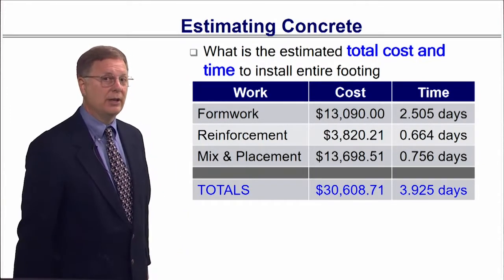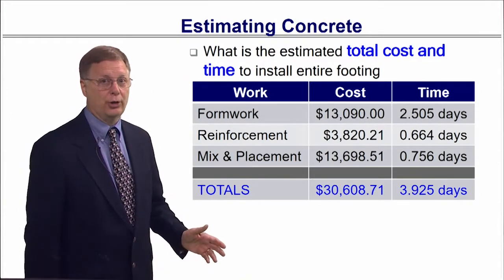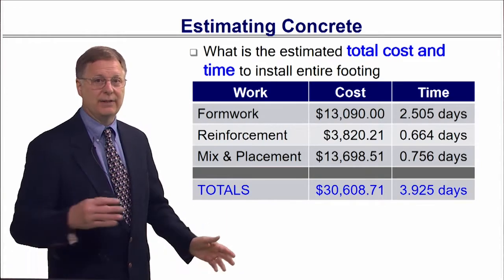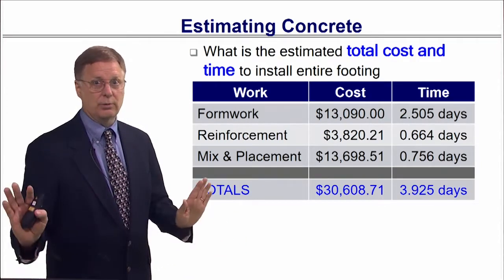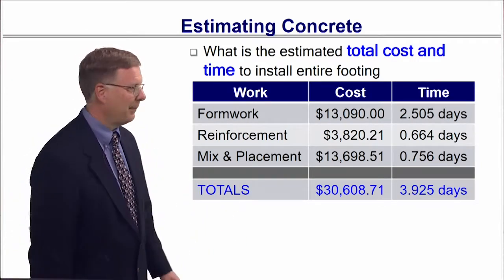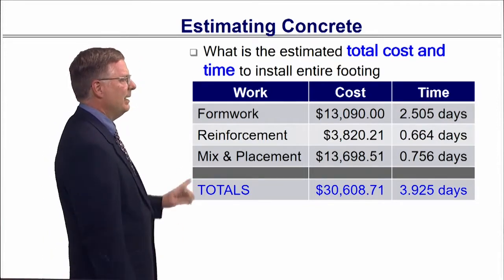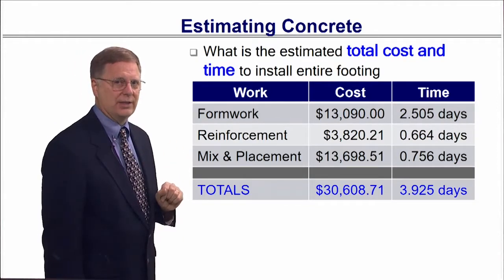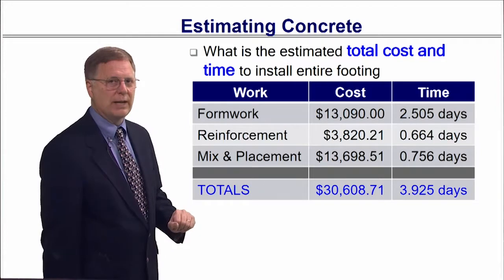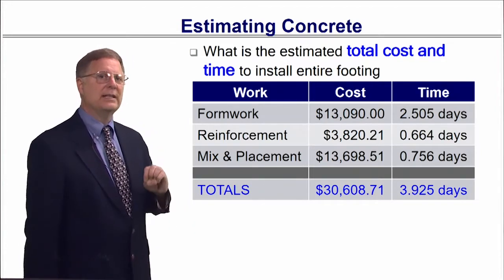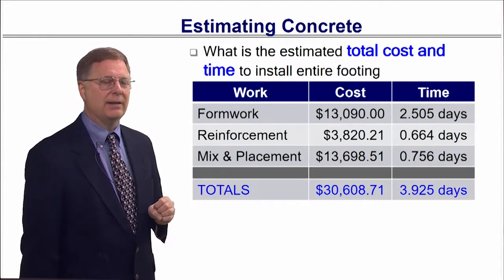You'll find that on a job site, this may take a week or two simply because getting the different crews in there. They're different crews. They're not the same people. All right, now we've got our price. That's our unadjusted price. I also want to emphasize that you need to be thinking about area cost factors.